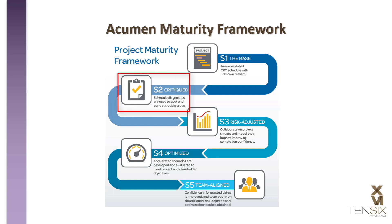S2, critiqued. The schedule is rigorously reviewed using Acumen Fuse metrics, and areas needing improvement are identified. Schedule changes are made in the original schedule software program or directly in Acumen S1. The exit criteria for this stage is a quality schedule as per Acumen recommended analysis and conformity to industry standards.